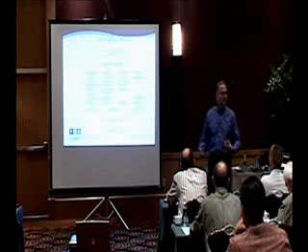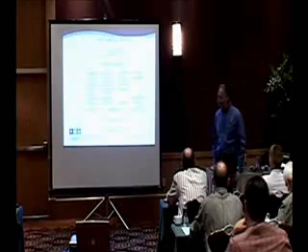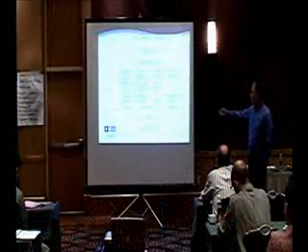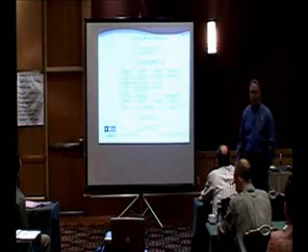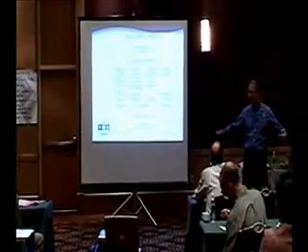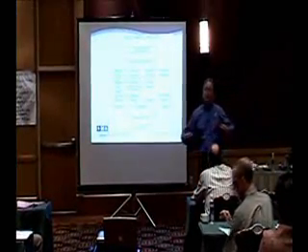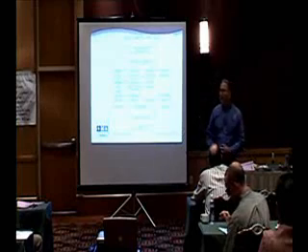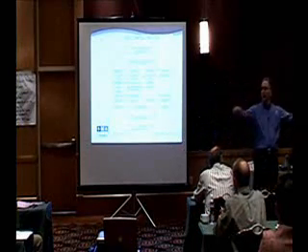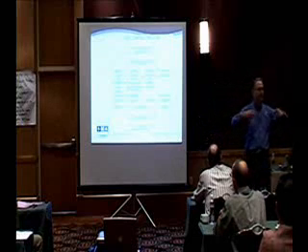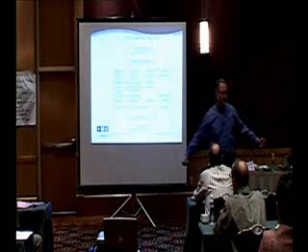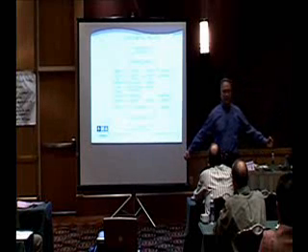We're going to show you some examples of things over the next couple of days that you could put into your standards. From the production standards that we've established, we pull them right into our subcontract agreements. Now, one way for production builders to be more efficient than custom, and therefore be able to charge less, is that our trade contractor agreements can be across the board. They can be for a whole community. They can be for a period of time. We used to write our trade contract agreements for a year. They were good for a minimum of one year.